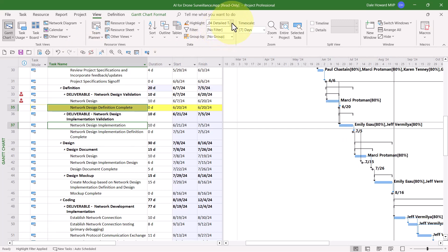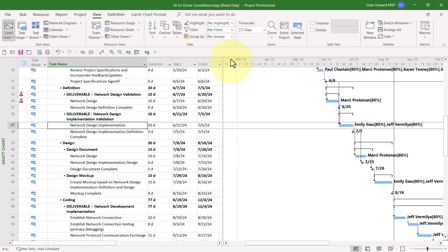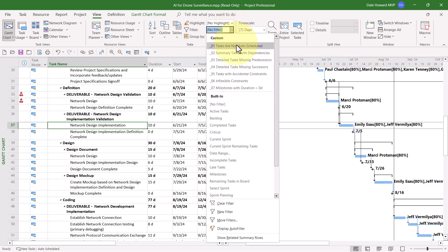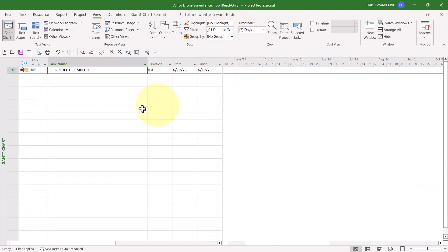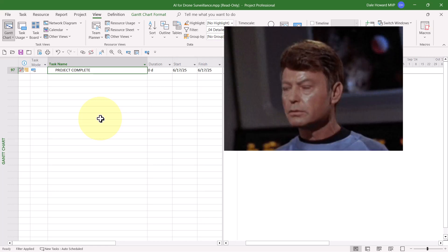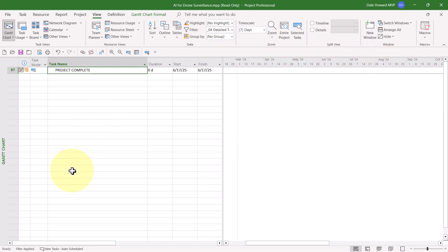Now let's remove that filter as a Highlight Filter, and we'll go back. Detailed Tasks Missing Successors, and look, we only see one task. That is the final task, Project Complete. So at this point, we're good. We don't have any more problems of that type.